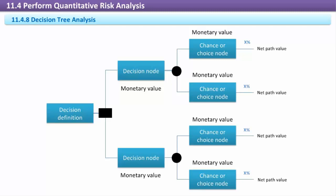Decision trees typically show monetary impacts, but EMV can be used to express any measurement quantities, units, or time periods. Since EMV is only an average, decision trees do not make an absolute prediction about the result of alternatives, so they should be used only as one factor in the decision making process.